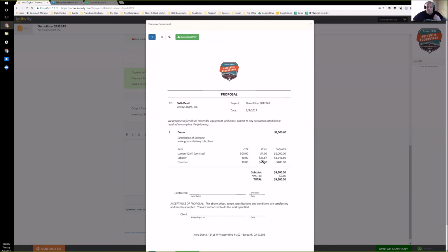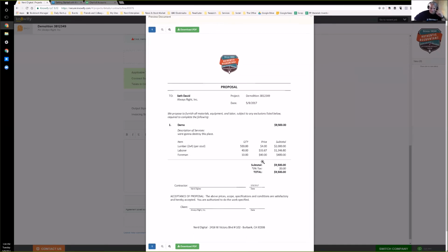The other thing is, if you don't want to bill like that, if you're doing fixed costs or a general scope with inclusions and exclusions, you still build your phases that way so you can allocate them correctly yourself, because that's how the person is thinking about it. It's all just a matter of preference.